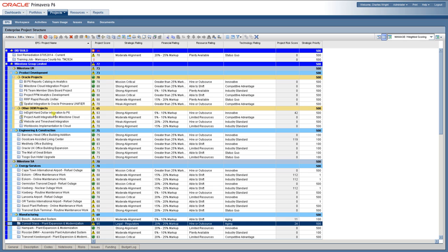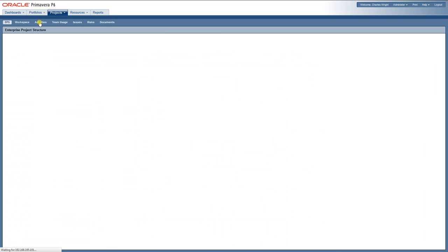Let's assume for a minute that a planner has gone along and planned it and handed it over to me and said that we need to look at ways to shorten the project duration before we get going, because the client is not happy about the time it's taking for us to do the project. One of the first things I'm going to do, and I think most of you will know this, is we need to focus on the critical activities.